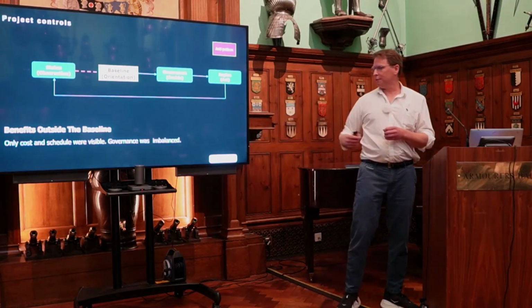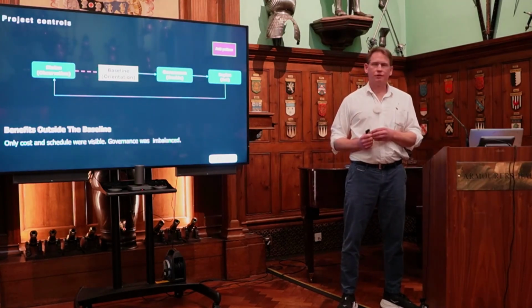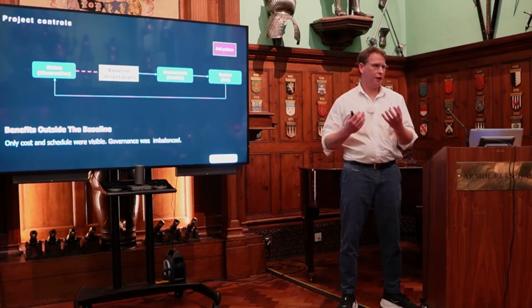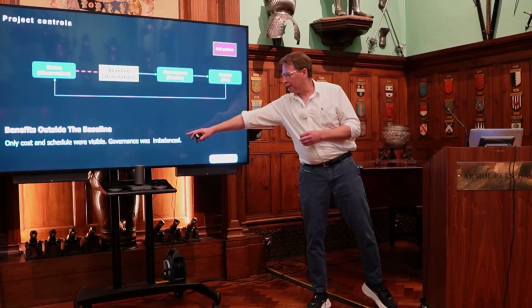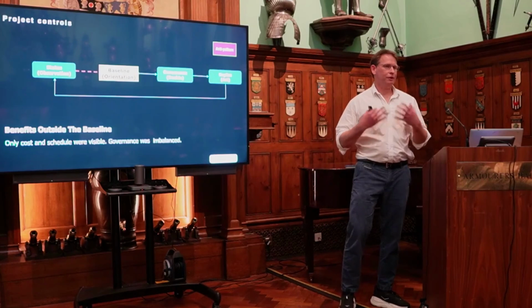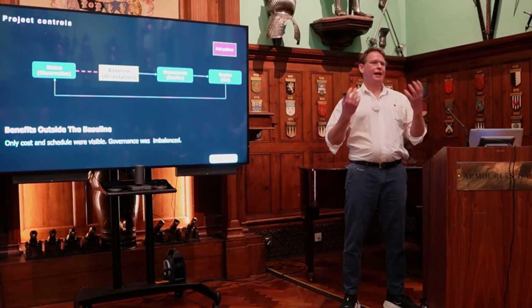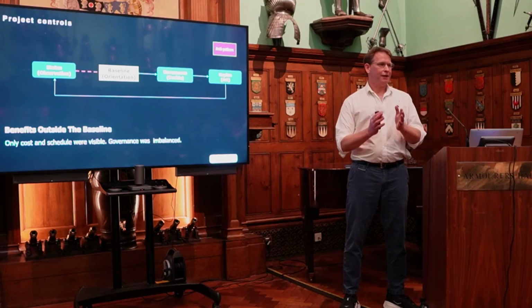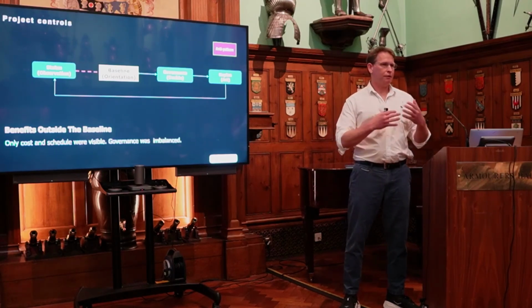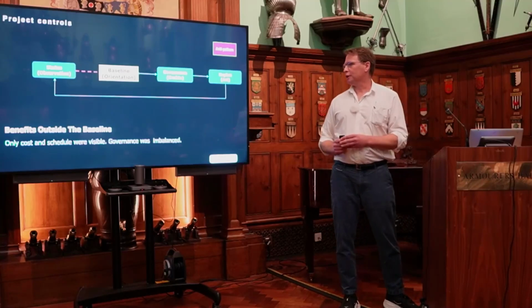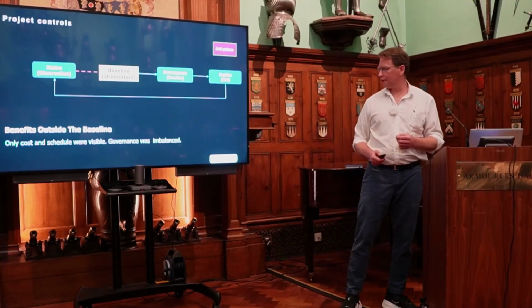When we were called in at one of my previous companies, they were struggling to make decisions. They were struggling to do their stage gate reviews of programs. And again, their common operating picture was flawed, because even though they cared a lot about benefits, you would get programs that were just hanging around because they had the resource, they had the cost, they had the profile, even if their benefits had tailed off, because benefits were not being considered.